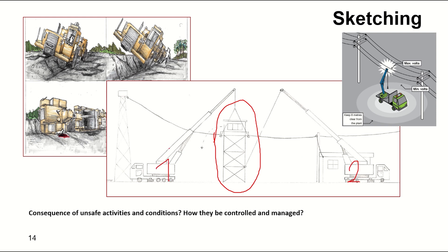Two different cranes are working to dismantle or move this small tower, and there is a power line nearby. The sketch shows what kind of risks are associated with this operation. You can also see a trench where the driver cannot manage adequately, and then an incident occurs. This sketch is also used for instructing the driver — you can see different zones or buffer areas showing the required clearances and headroom from the power line. This shows how important and useful sketching is.